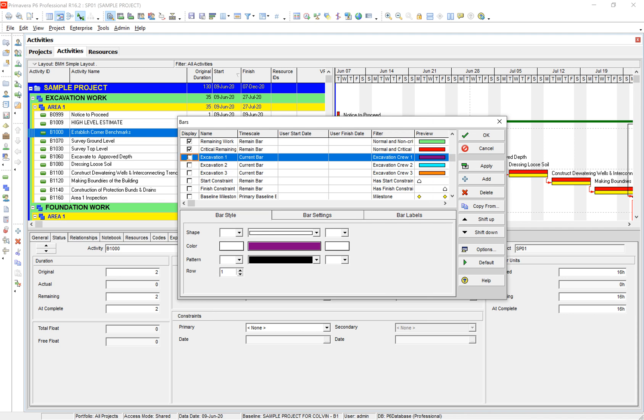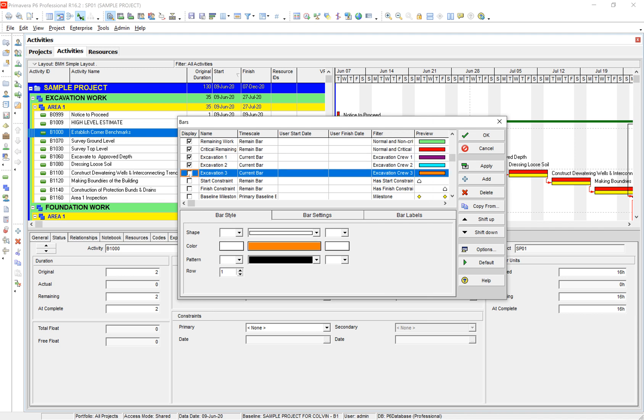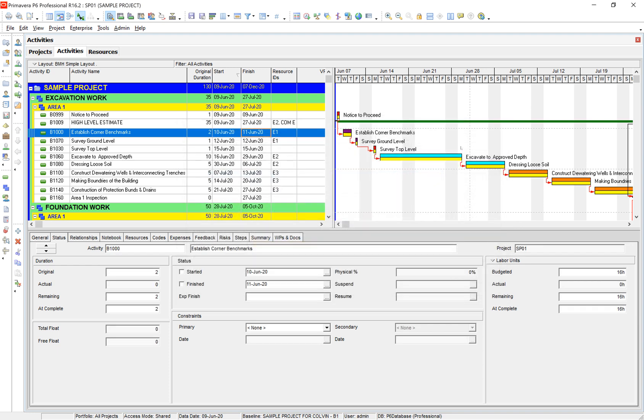And once we select these options to display I go ahead and select apply and okay. Now you can see we've gone ahead and actually changed our bars based on the resources that we have assigned to it. So we can see crew 1 right here, crew 2, and crew 3.